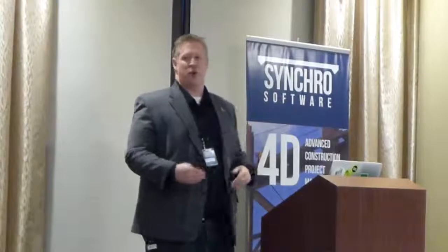But that's pretty powerful, right? We're trying to communicate to doctors who don't understand construction, don't understand anything about what's going to happen. All they know is when they come in on Monday, they're not going to know where to park, or where the ambulance is supposed to go. So by taking still shots or videos, I can communicate to an owner, a hospital, with lives on the line, here's how you're going to get your ambulance in, here's how you're going to get your deliveries.